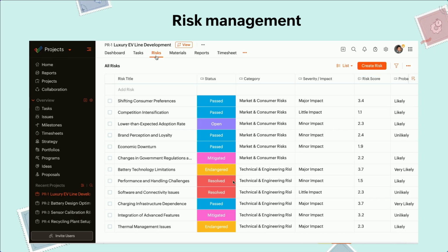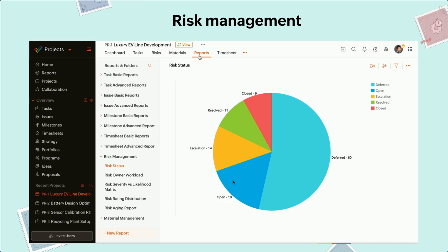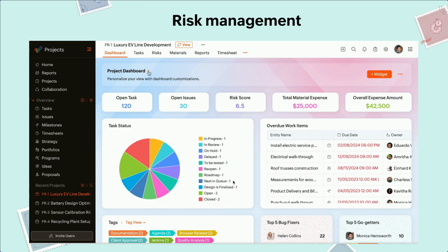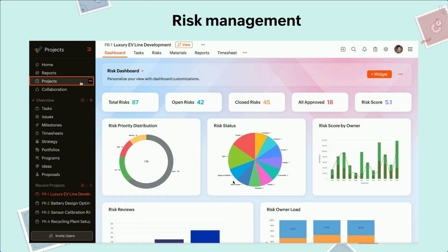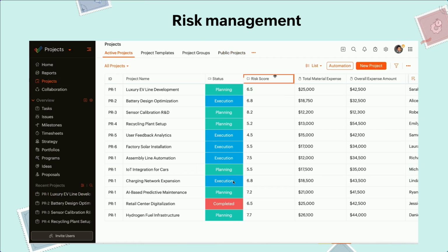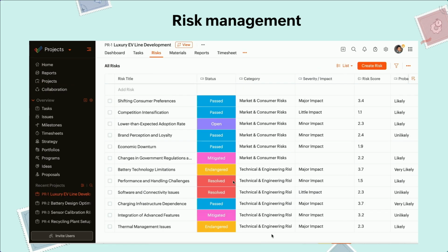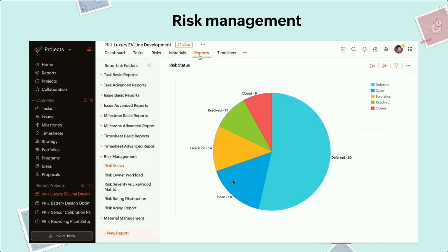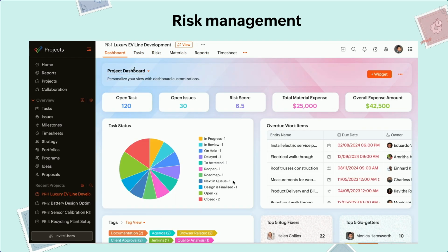It's a quick example of how risk management is covered in the Zilker organization. They'll be able to create a risk and set the probability or the likelihood of the risk, and identify the risk score for each risk. And the risk scores of the individual risks can be summed up together to see that at the project level.